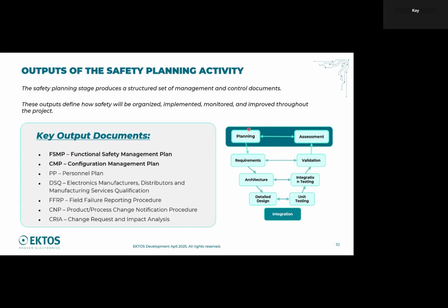But again, to start the design stage, these two documents are enough to start the process, and the process is something which runs in parallel. So in reality, we are establishing these two documents and running the rest of them during execution of the product, when it is necessary, and defining when it is necessary.